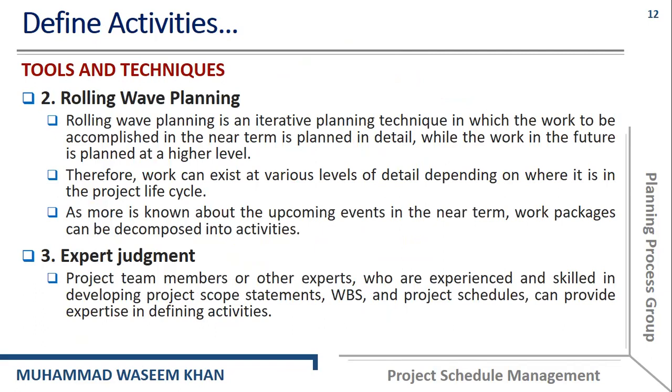So then we can have the tools and techniques like rolling wave planning and expert judgment. I won't explain expert judgment because you know what expert judgment is. Let's discuss rolling wave planning. Rolling wave planning is an iterative or repetitive planning technique in which the work to be accomplished in the near term is planned in detail, while the work in the future is planned at a higher level.